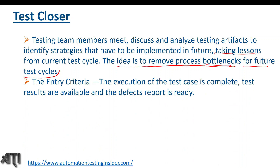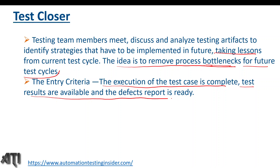Now let's talk about the entry criteria and exit criteria for test closure activities. For entry criteria: first, the execution of all test cases must be complete. Second, test results are available and the defect report is ready.